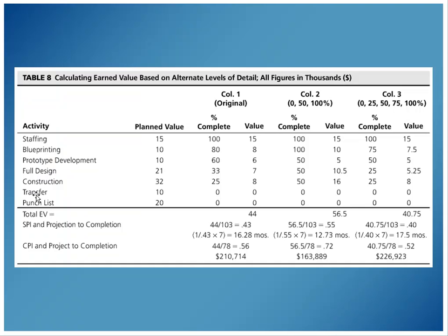More than likely these tasks are a little too broad to do that 50-50 model. And if we did something a little bit bigger, instead of the complete freedom that we have for 100 different values, we say 0, 25, 50, 75, 100. So we're still going to ballpark a quarter of the way, halfway, 3/4 of the way done, or completely finished.